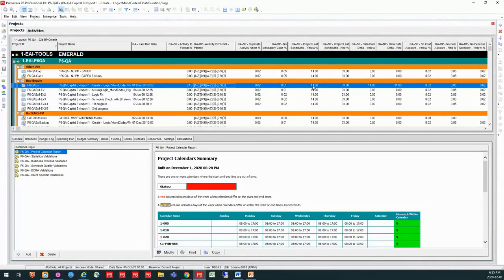And what I've set are the number of days that are going to be since my project last scheduled. So from 0 up to 14, I'm going to get a green indicator saying that I am fine with the time since my project has last scheduled. Between 14 and 31, I am actually going to get a yellow indicator saying, okay, you've gone a little bit long on scheduling this project.